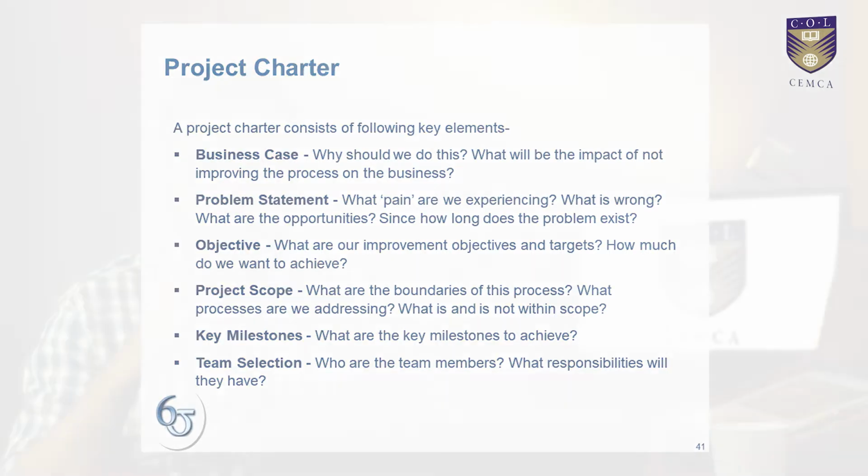We then talked about what a problem statement is, which talks about the synopsis of the entire process that you're going to work on. What is the pain in the process? What exactly is the customer saying? What is the current state? And the problem statement does not have any blame, complaint, or cribbing. It starts with a context. It has facts and figures, and it doesn't have any root causes, and it does not talk about any solution design. So that's from the problem statement point of view.